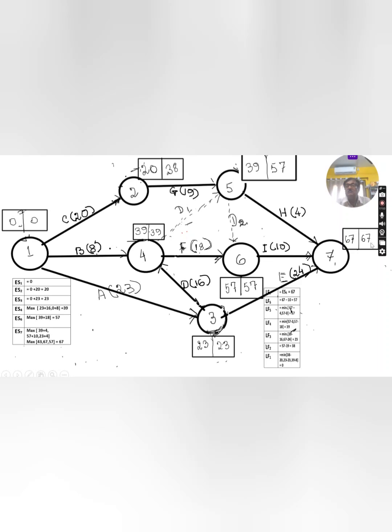First 67, which is the latest finish time, minus 4, this is 63. And for this case 57 minus 0, that is 57. Which is the lowest? 57 is the lowest. Check. How is the 5? This is 5. It has become a little small, so you can check it. 67 minus 4 and 57 minus 0, that is 57. This is the latest finish time.